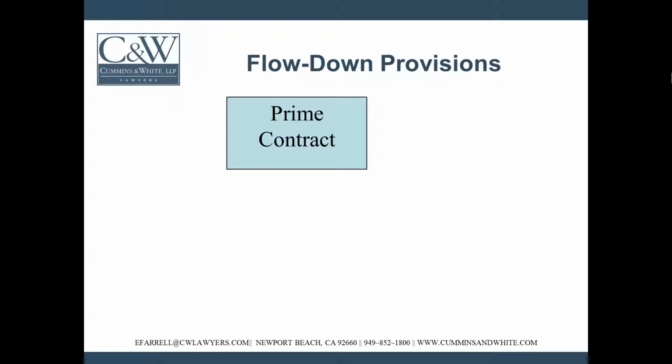Flow-down provisions start with the prime contract between the owner and the general contractor. This agreement will set forward all obligations and duties and requirements of the project from the general, and include detailed scheduling and payment requirements that the general contractor is to abide by throughout the life of the project. The prime contract will also have any restrictions for subcontracting and for material suppliers that the general may subsequently go out and attempt before the contract work begins.